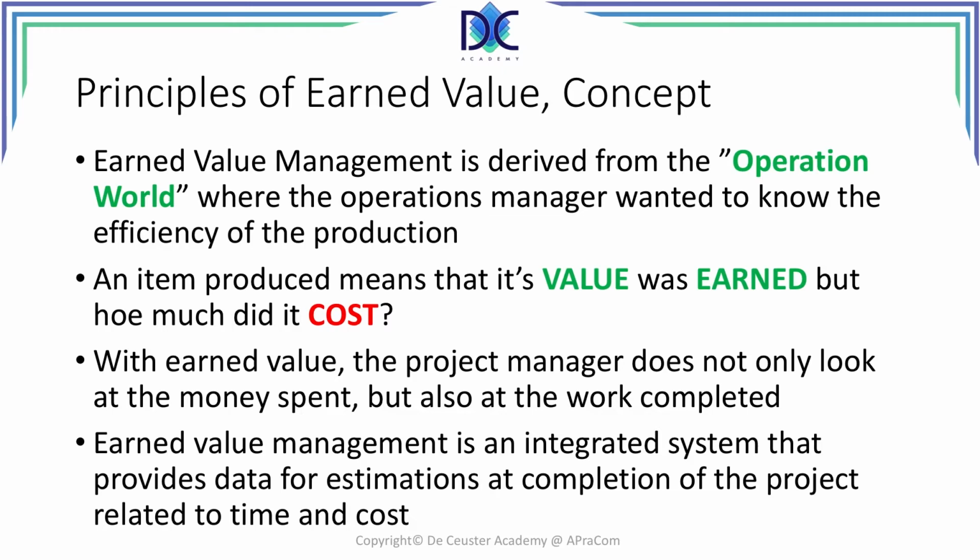So when you plan to create a bicycle with a value of €1,000, when you create the bicycle, you earn that €1,000. So that's one aspect. You complete something, you earn its value, but that value is the estimated value. How much did you really spend to make that bicycle? What was the actual cost?